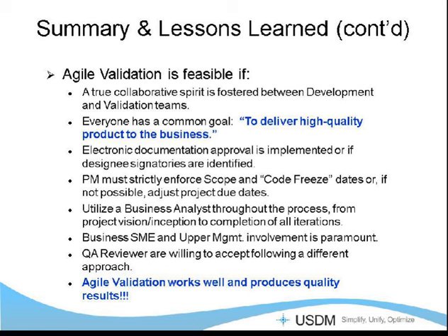The PM is a very critical role in this because they're the ones that are primarily responsible for maintaining some semblance of scope, maintaining some semblance of freezing the code so that the validation folks have time to actually do the job on the back end. And then, if those things change, ideally the date would change, but in our case, the date was not movable. It was the immovable object.